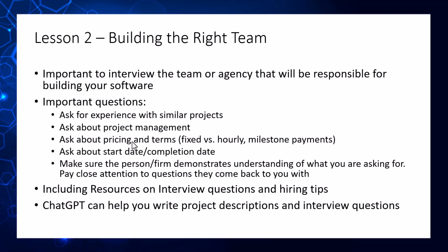If the price is fixed, are there milestone payments where certain amounts are due once you agree on requirements, once the design is given to you, once the code is finished, once you've tested it, once it's deployed to your server, things like that. Just make sure that you're aware of what milestones are there and what that payment schedule looks like.